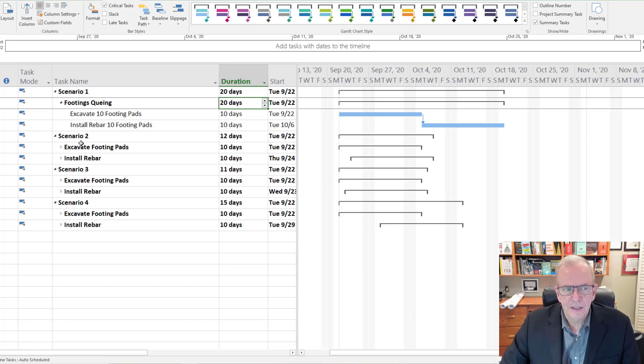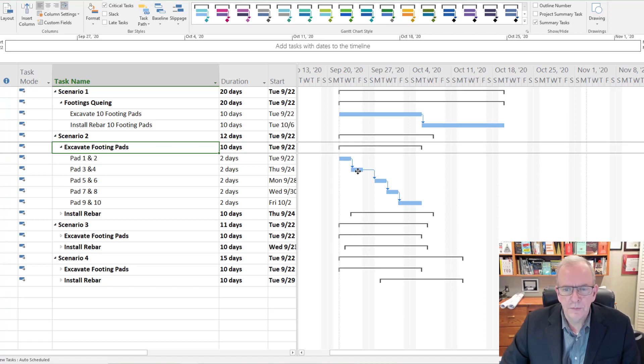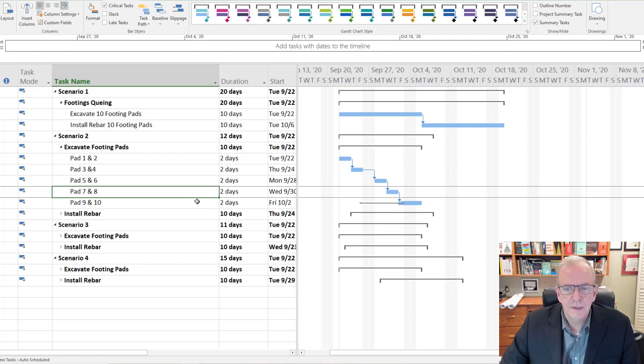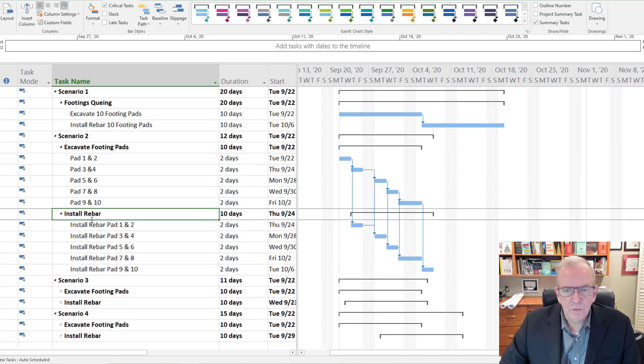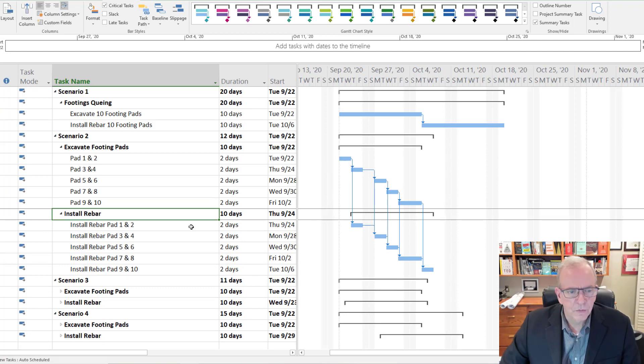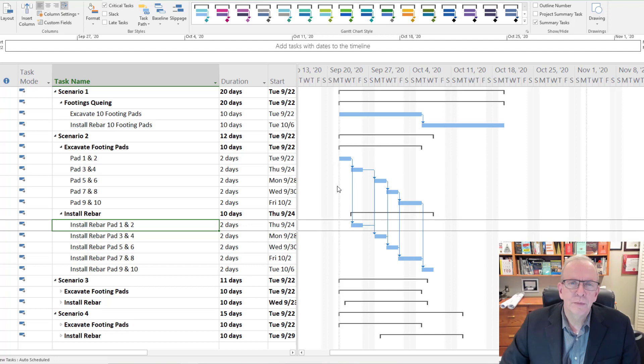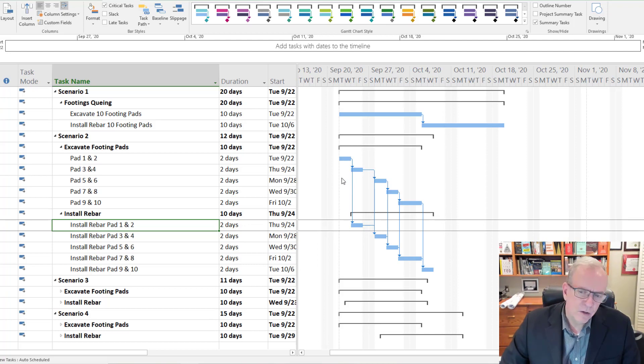So maybe we look at this a little bit differently. Let's take a look at scenario two. We're gonna do two pads and then when we finish those two pads we're gonna do another two pads and go so on and so forth. If we have the install rebar, after we get two pads done, we're gonna start to install the rebar next. You can see this is where this waterfall terminology comes from.